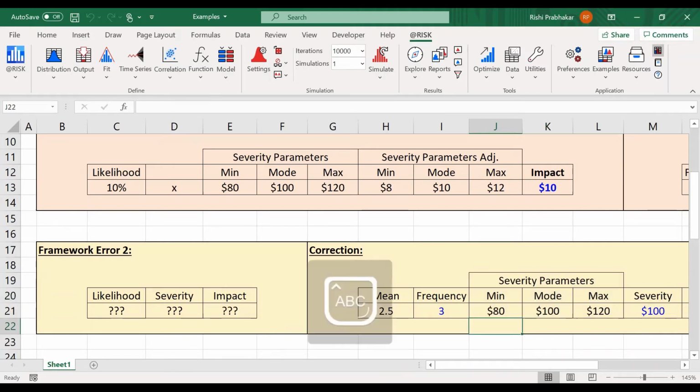It's so important, I'm going to write it in caps, exactly once. What is the severity of this risk event if it happens exactly once? That's so much easier for you to think about, so much easier for it to parameterize. You potentially have data based on individual observations for worksite accidents, for vehicular accidents on site.